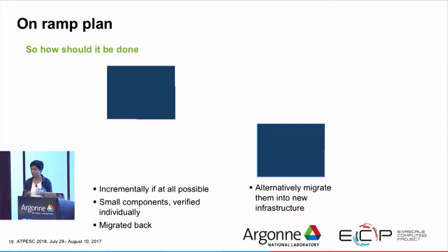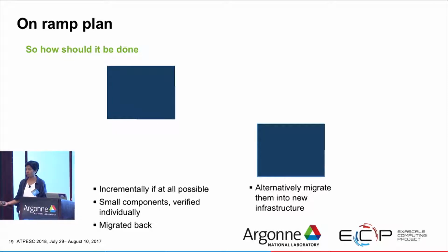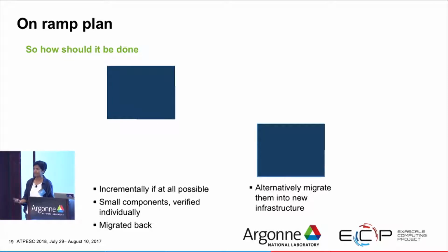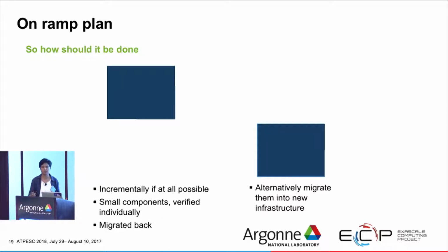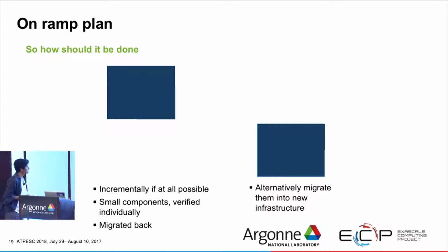If your changes are much deeper at the infrastructural level, then you generate the infrastructure separately, test it, satisfy yourself that that infrastructure is fine, and then you move capabilities one capability at a time into the new infrastructure.